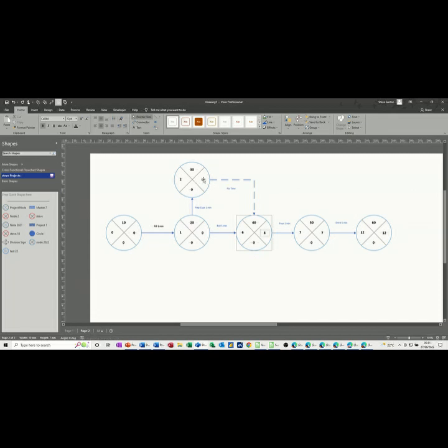and we put 6 on there, no time, 6, you take 2 from 6, it gives you 4, so that's your float, 4, you've got 4 minutes float time, so the whole task is 5 minutes, it can go on any time during that task. So then we're coming back from here, we've got to take 5 minutes off this 6, which gives us 1, so that's 0 again, 1 from 1 is 0, and then we're back to the beginning. So you can see all the zeros, that is your critical path.